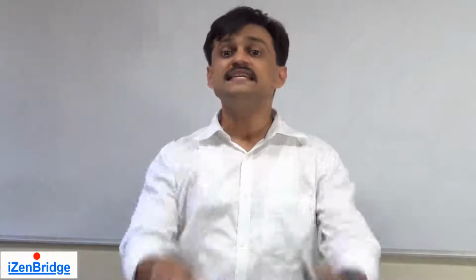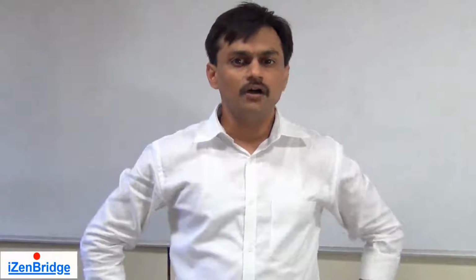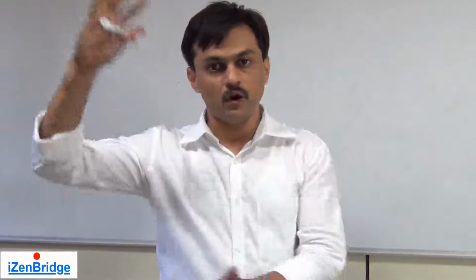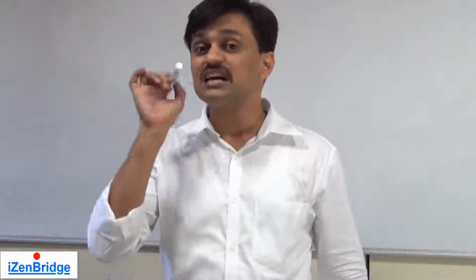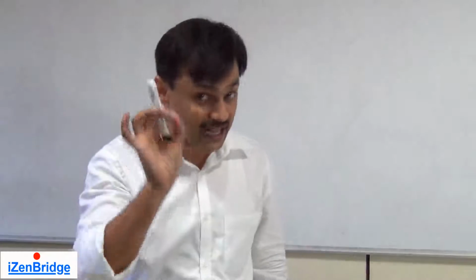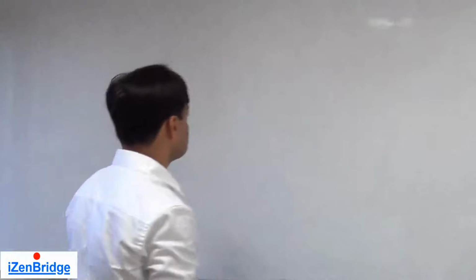Another thing, it's easy to identify generic risk. For example, we may have an iteration in a project. The customer may not sign off in the given timelines. Such kinds of generic risks come from your organization process assets and are easy to identify. But the risks which are specific to your project will require real analysis and expert judgment to get identified. So let's look at input, tools and techniques, and output of identify risk.